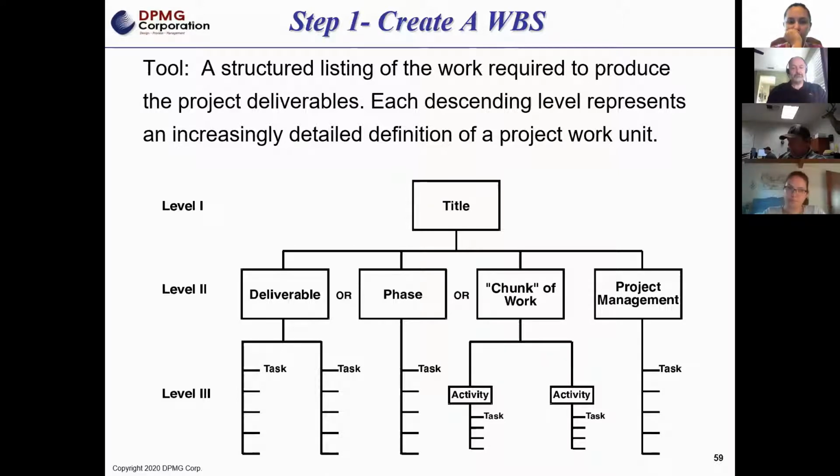The thing is, your projects can be broken down by, I'm going to break down my work by deliverables. What are the deliverables? Or I can create a work breakdown structure based on the phases of the projects that have to be performed. Or I can break it down by the chunk of work that needs to be done. Or I can break it down by how I'm going to manage it from a project management perspective. So you as a project manager, but more importantly, as an organization, the organization has to decide how you want your work breakdown structure broken down. And typically an organization will have a particular approach, what makes sense for them.